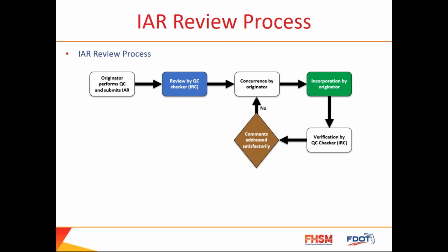Once comments are addressed satisfactorily... if comments are not addressed satisfactorily, then we go back to concurrence by the originator and we go through that process again. If comments have all been addressed, then the IRC submits the IAR to the State Interchange Review Coordinator for quality assurance.